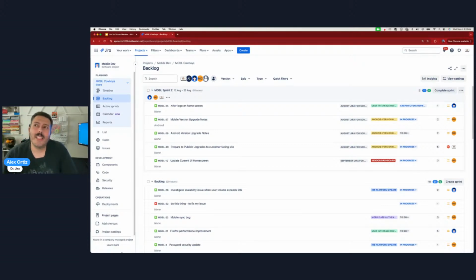And the team will help you understand if those stories are really big because the story points that your team estimates are going to be big, right? They're going to come at you with some really big numbers. And so whenever you start seeing 8s, 13s, 21s, assuming you're following Fibonacci, those are really, really big red flags that you take back to your team.